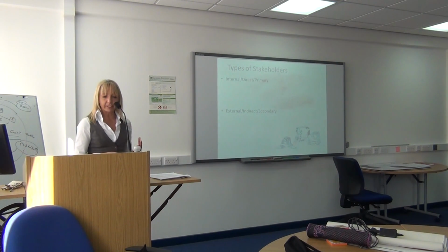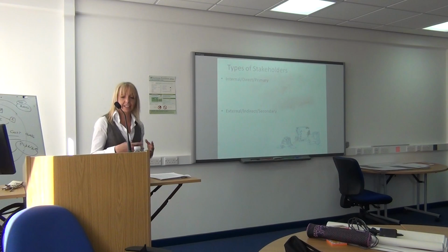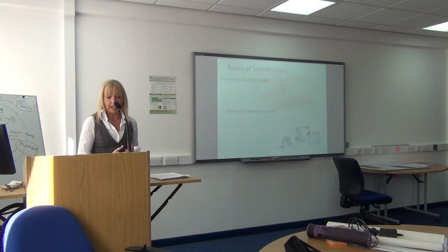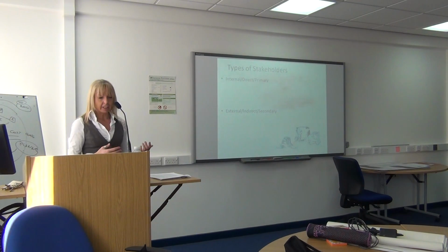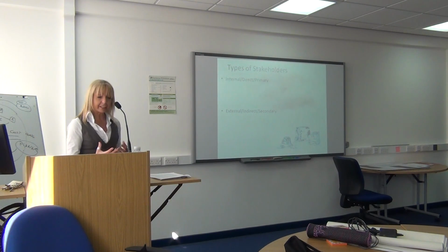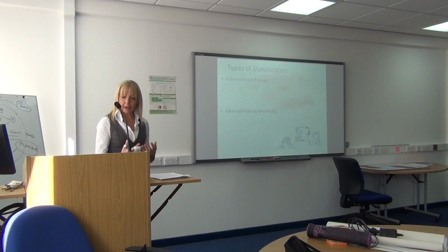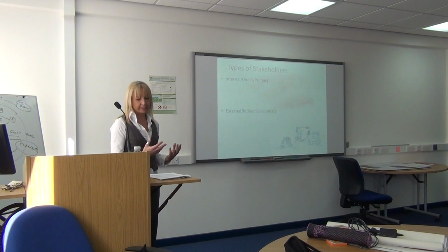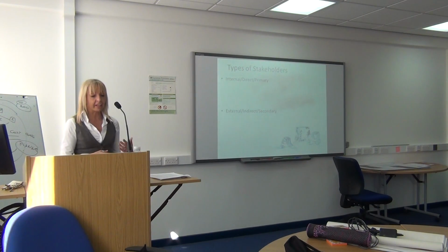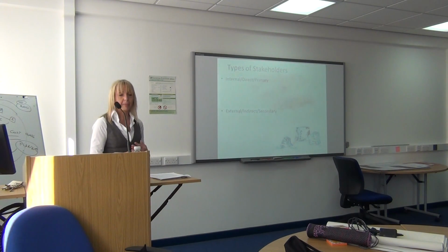The engagement involves identifying different categories of stakeholders, gathering information about them, identifying their missions, determining their strengths and weaknesses, their interests, their power, identifying their strategies, and trying to predict their behaviour and develop and implement a strategy for managing these people.